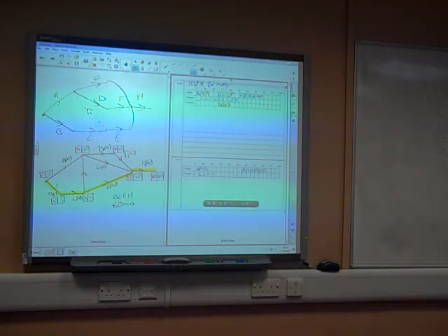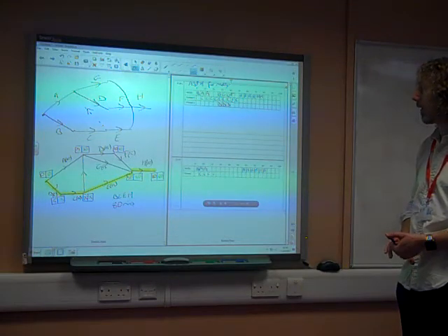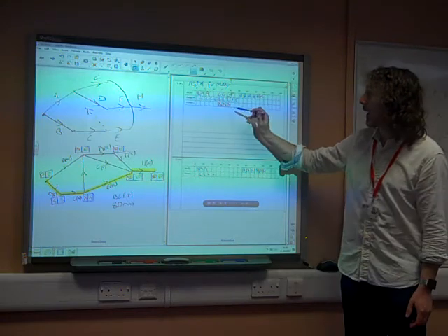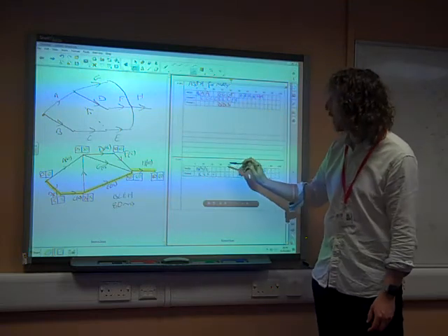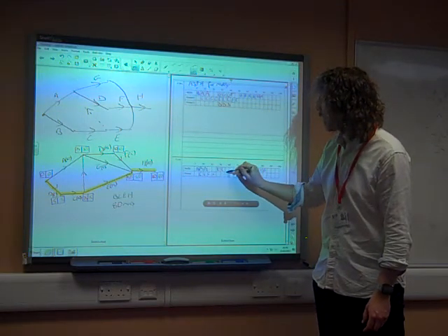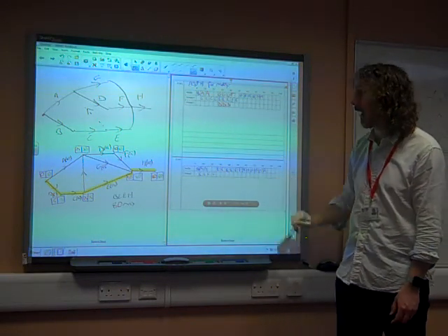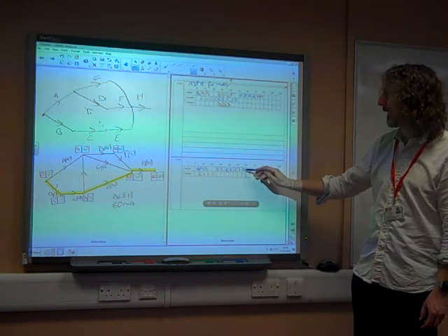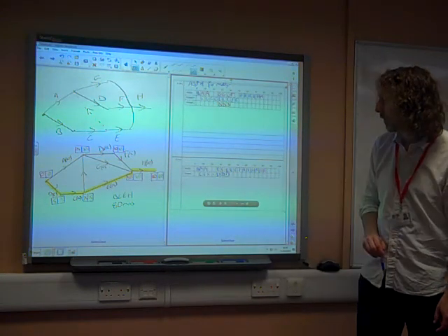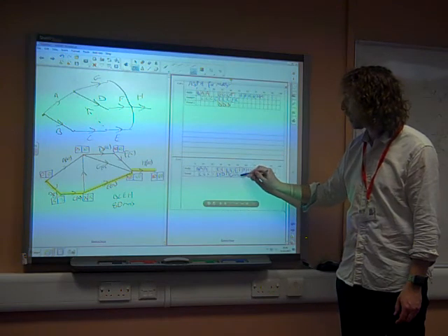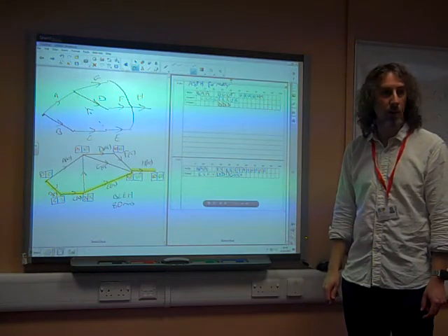Now we've got to fit the rest of the things in. Molly still has to do F in order to meet our requirement. What could we do? Well, look, if we have Molly doing E at this point, and push F till after that, that would fit, wouldn't it? That's 5. Lots of 5 minutes for E, and then we can fit F in there. Now F needed D to have happened before it, so let's put D at that point, and G was also at that point, and there, that's finished in time for H to start, and we've done it.